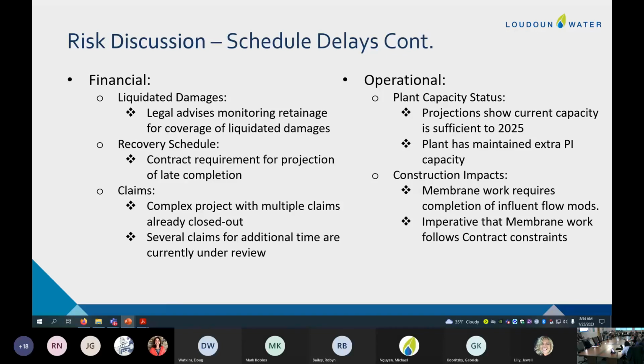And I just want to remind you that the board has approved a financial contingency for this construction project. Those are change orders that we're allowed to work through with the contractor. Once we set that value, it's 2%, right? It's 5%, 5% contingency. We'll come back to the board and talk to you about if we need more. This is well below any legal limit we might hit for the financial value of change orders that would draw concern. So the board will hear if we get anywhere near that 5% capital construction value on change orders. We'll talk about what that next part might be. You would have to vote to approve that. Correct. Right.